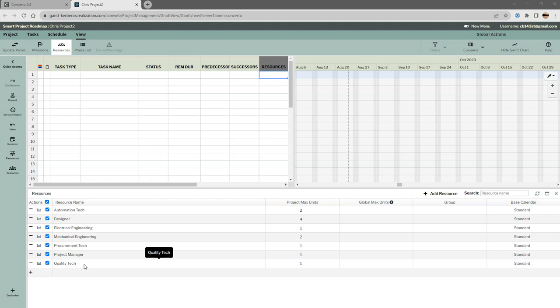But in larger organizations where we're doing multi-projects and those projects are using resources that are spread out across the portfolio, it's useful to keep things fairly simple. There is a hierarchy we could develop, but still, if you have 10 resources or so, that's probably enough in most organizations at the right level. So let's just start with that kind of assumption. Don't enter more than 10 resource types if you can help it.